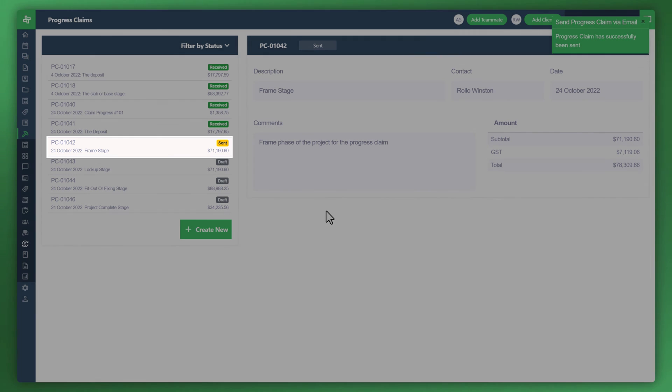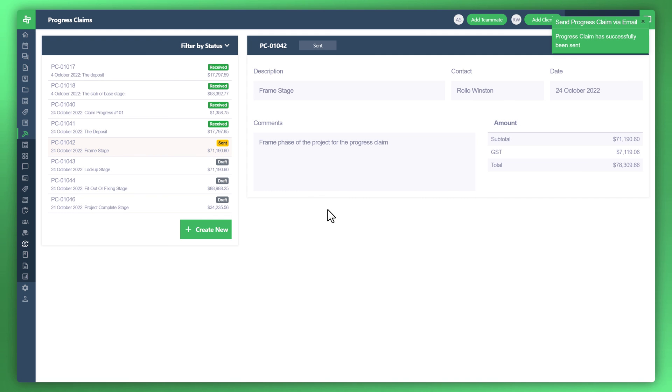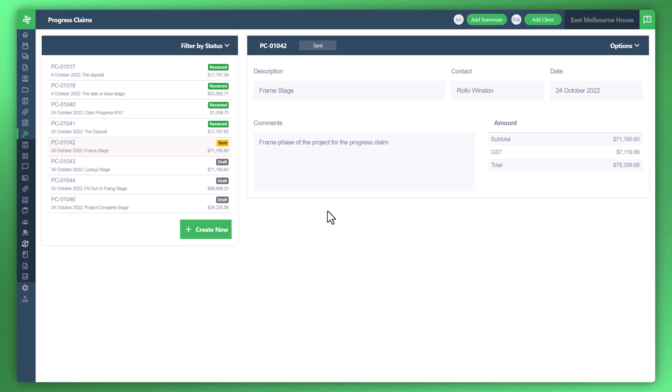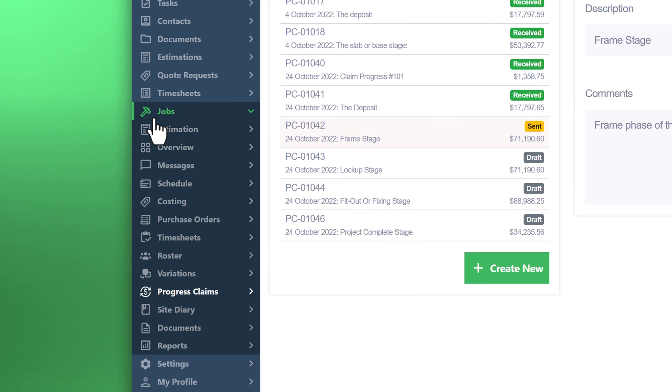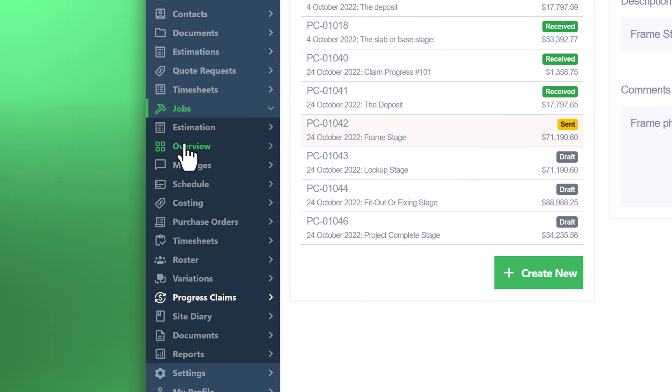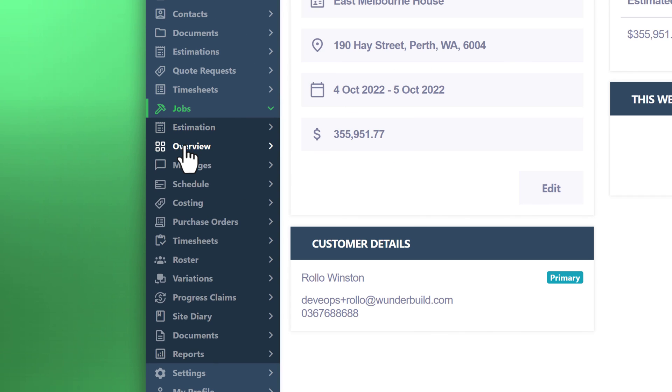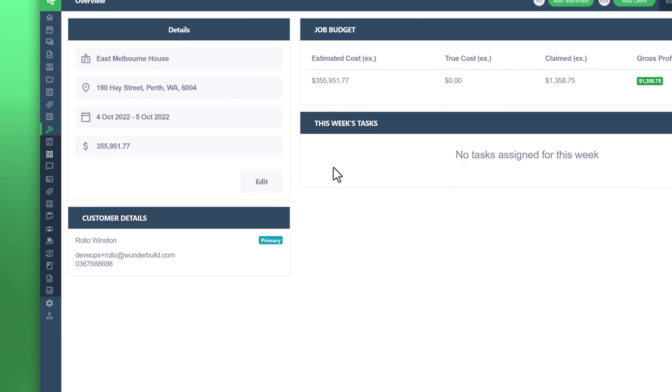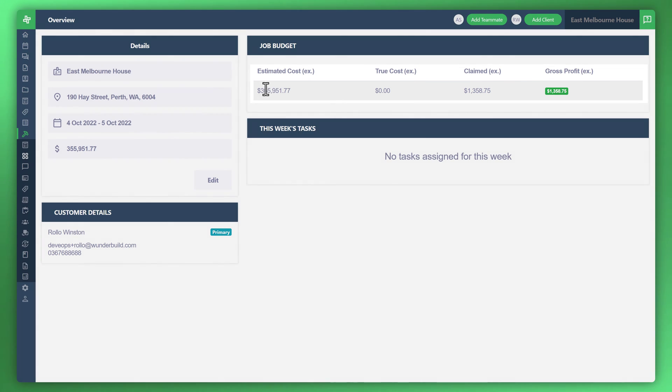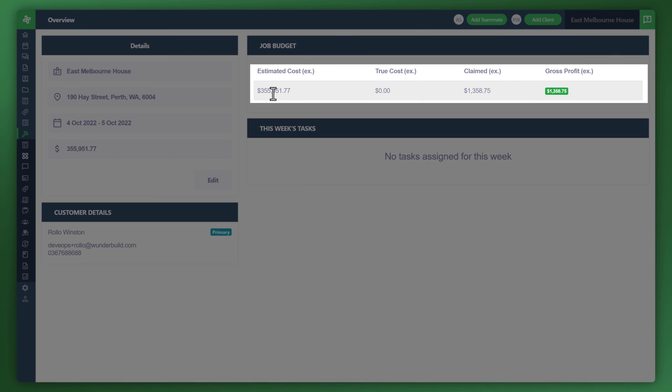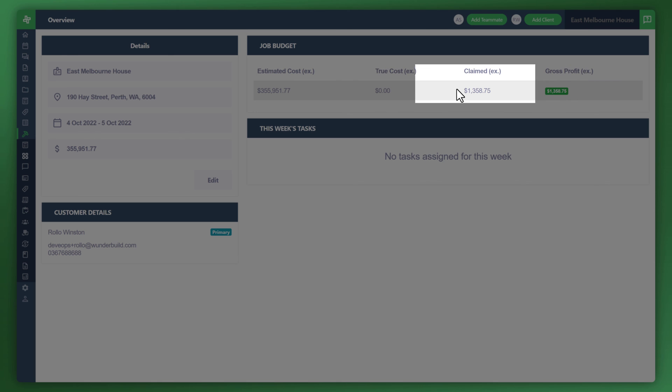This makes for a perfect way to manage all of your progress claims in one place. Now what you can also do is go back to the menu to the left and click on overview. You can now see here the estimated cost for the project, the job, and the amount claimed, the actual gross profit as well.